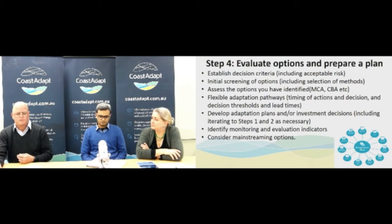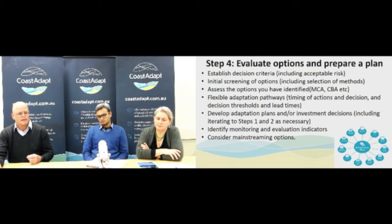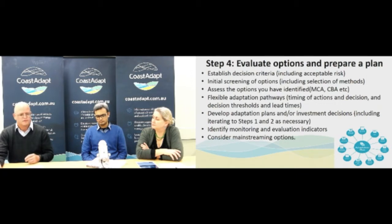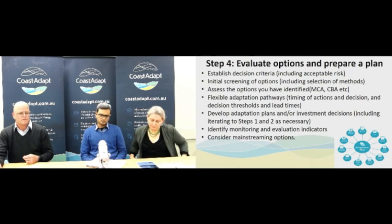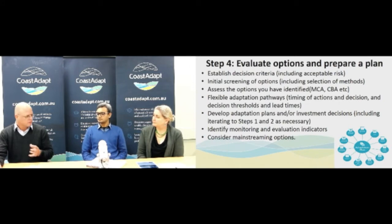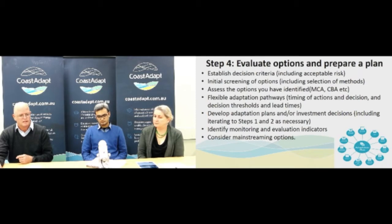We can do some initial screening of options — we provide a number of questions to help you do that within the CCADs framework. Then you need to start assessing the options you've identified. We have an information manual within CoastAdapt that provides great information about various tools such as multiple criteria analysis and cost-benefit analysis. It's important at this stage to think about setting up a sequence of solutions or adaptation pathways, considering the timing of actions and lead times required before you can implement them.